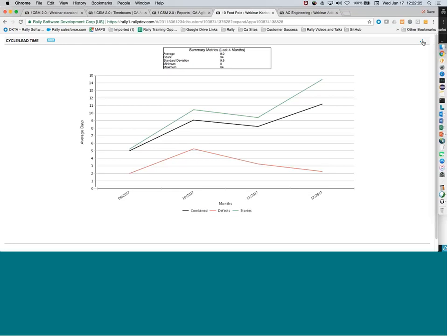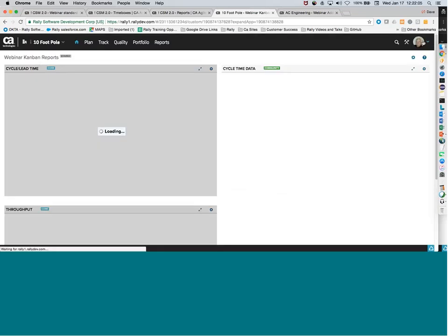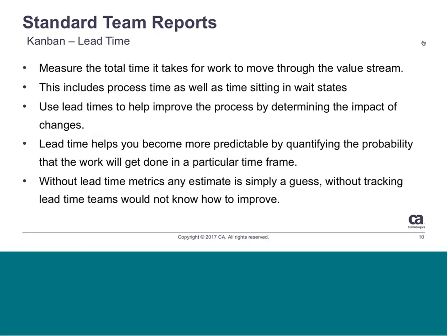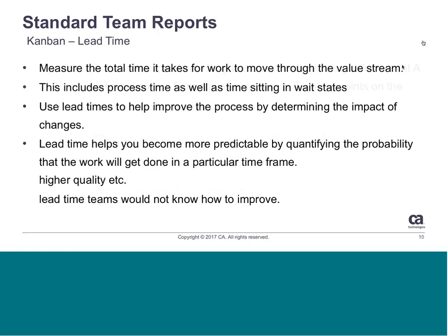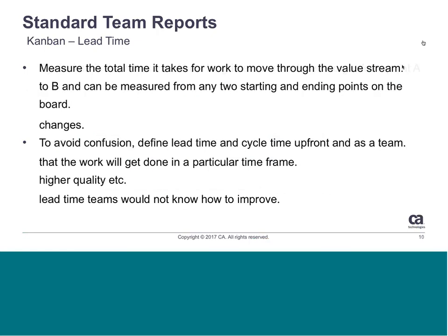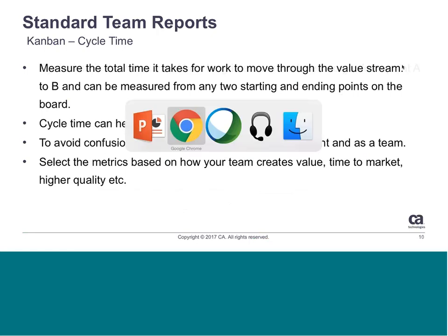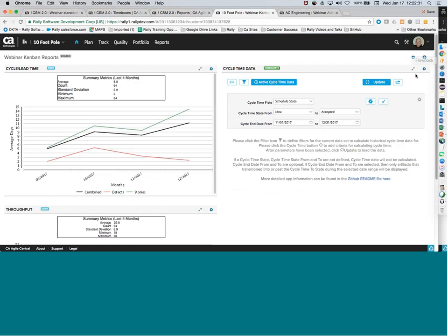Another area that you can take a look at is just understanding your team's capacity. So the capacity report is going to show you how much capacity members of a team have, and also how much they have committed to, or how much has been allocated to them. And the importance there is that we want to make sure we're not overloading, or our team members are not over-committing to work, and thereby introducing a risk into the project.